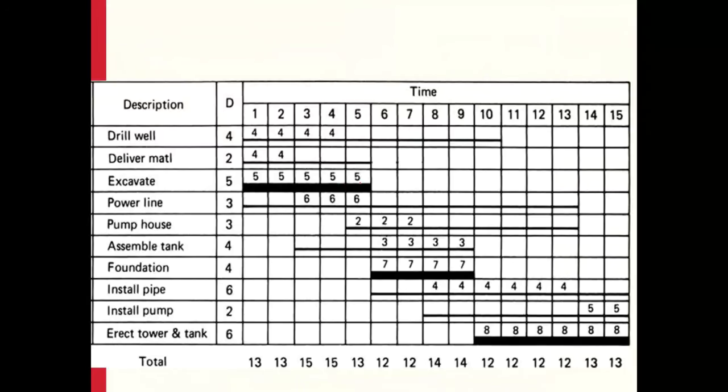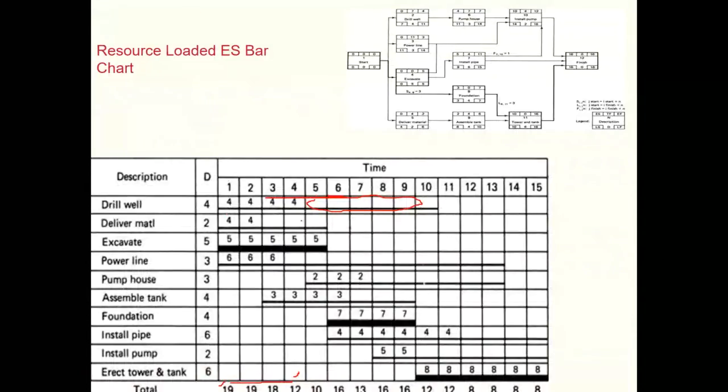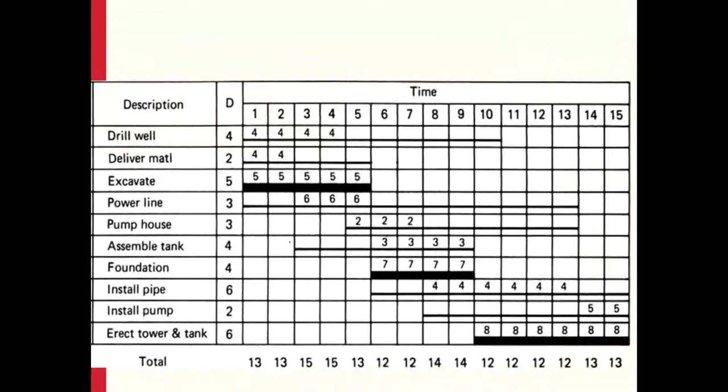So here, in this case, you can see activity 3, which was previously commencing right from the power line activity, has slightly been delayed to reduce the resource demand in the early days and to give us a slightly better resource profile.